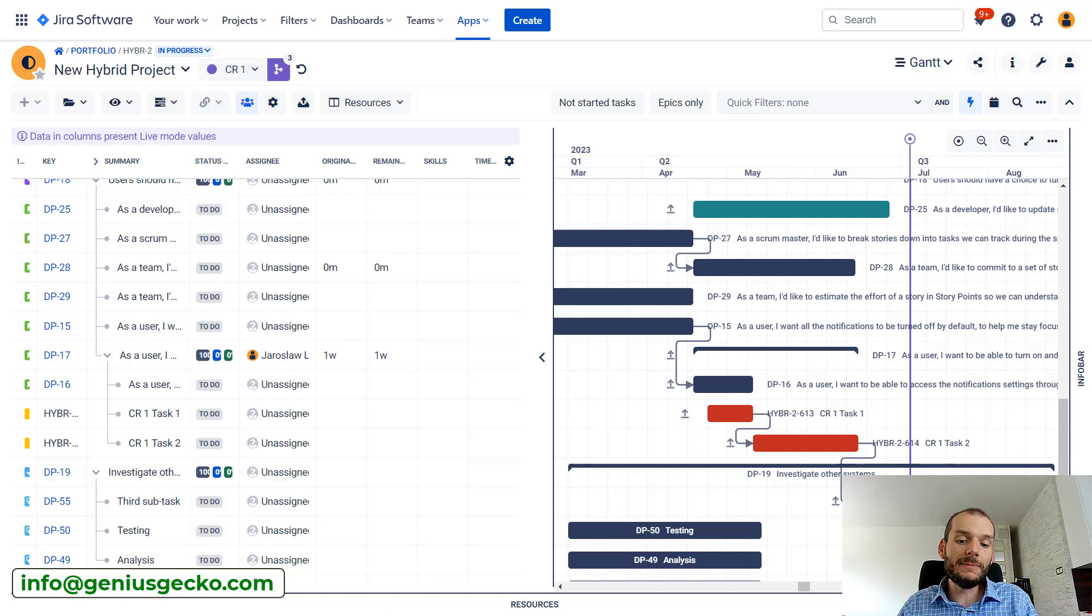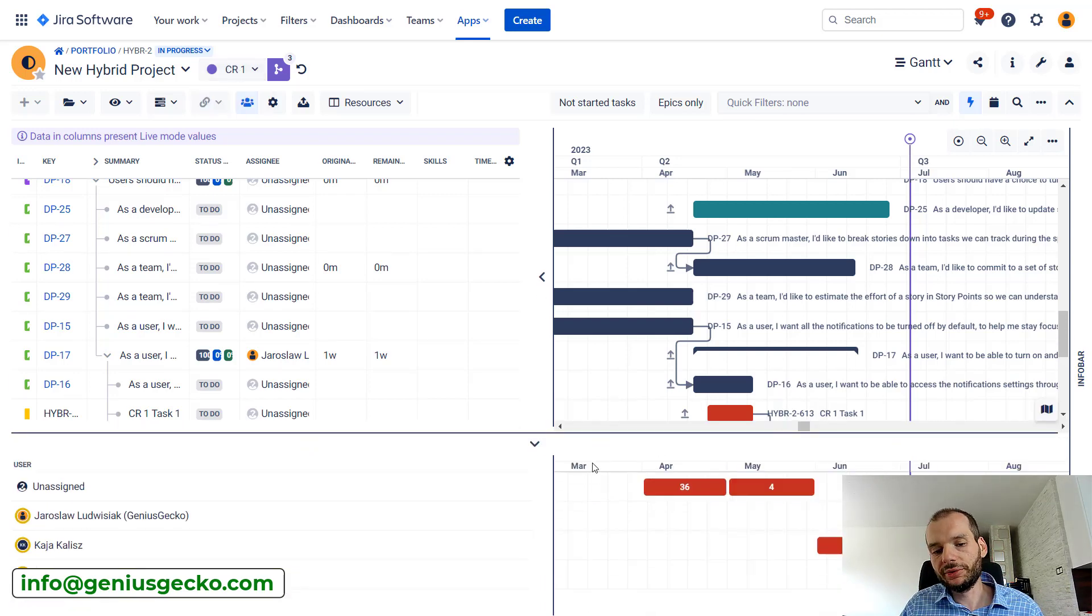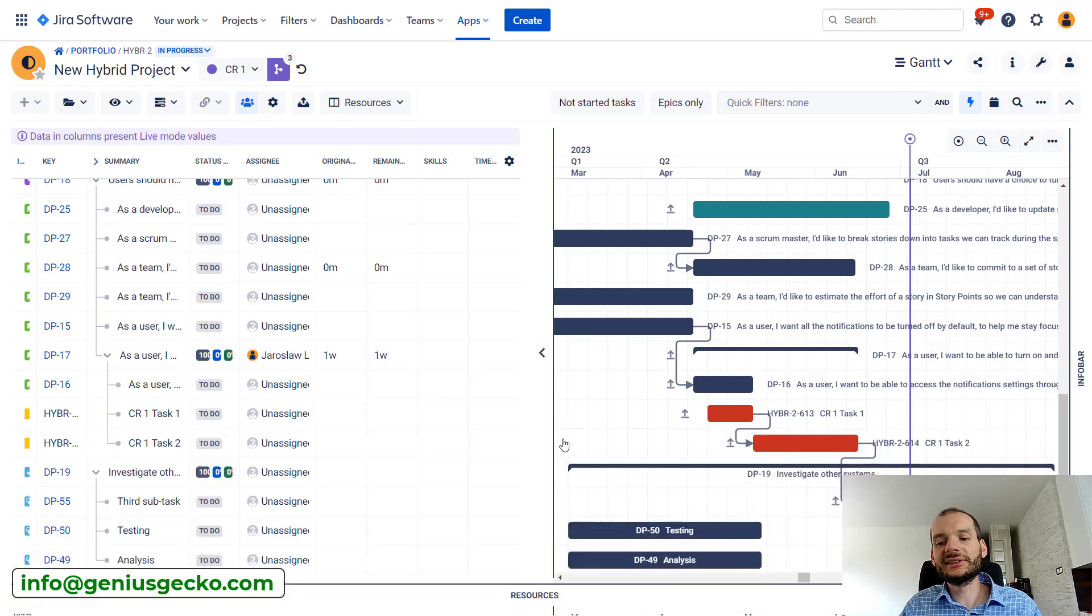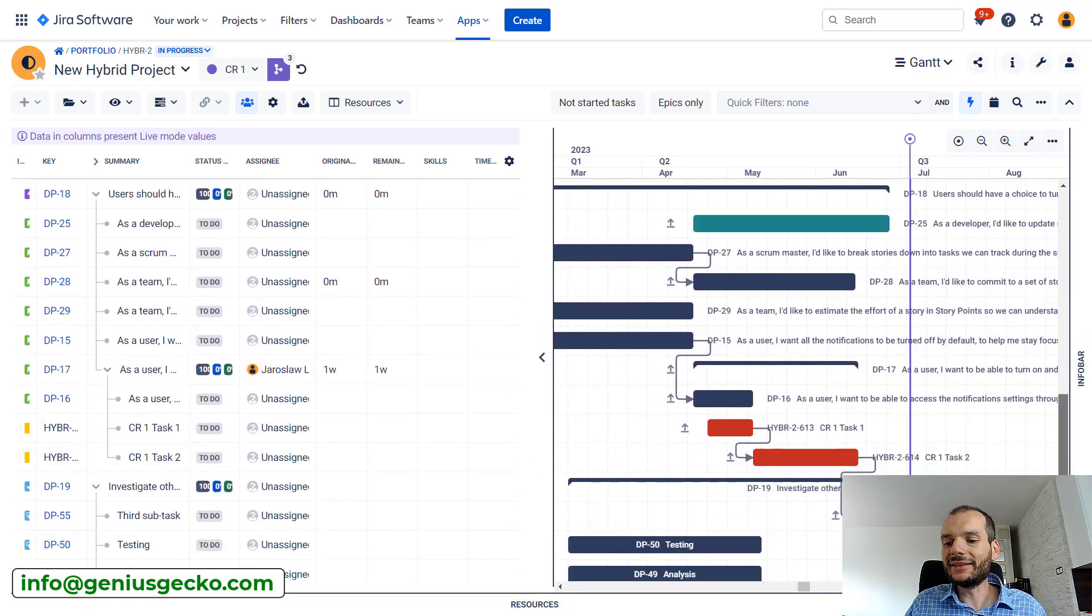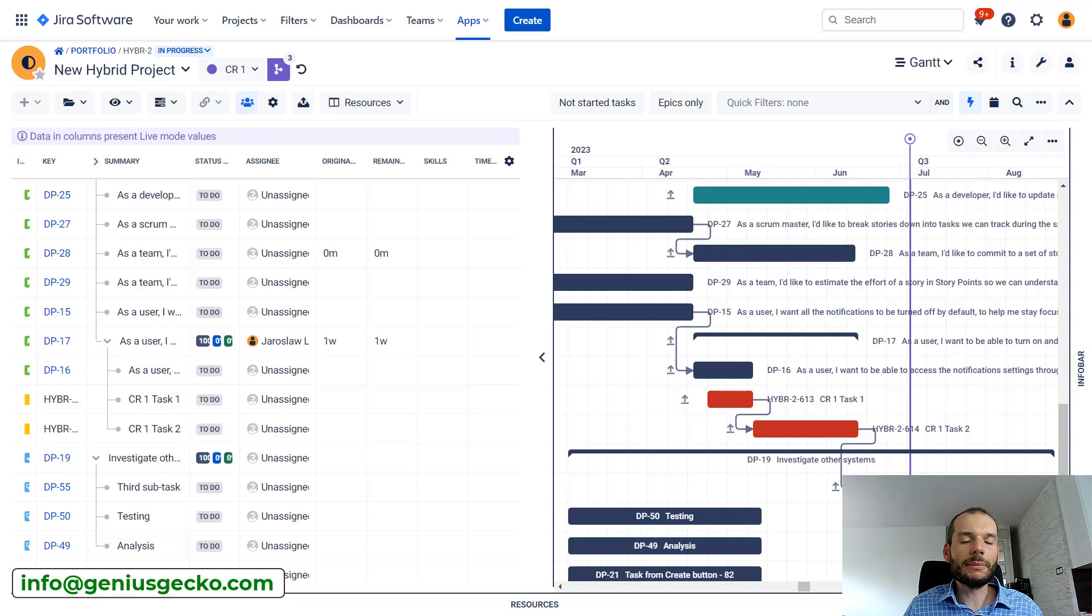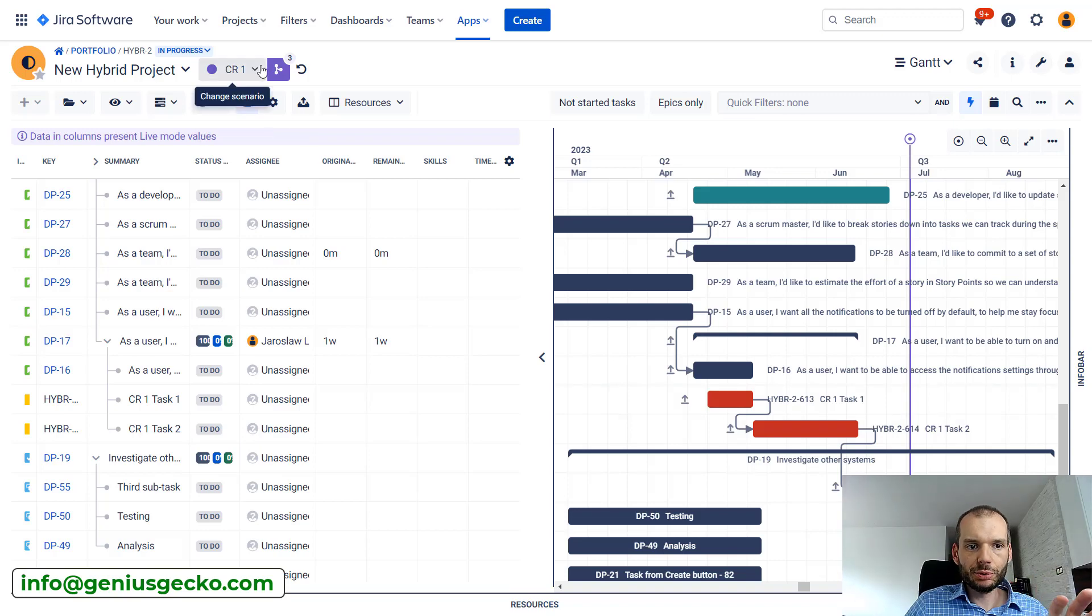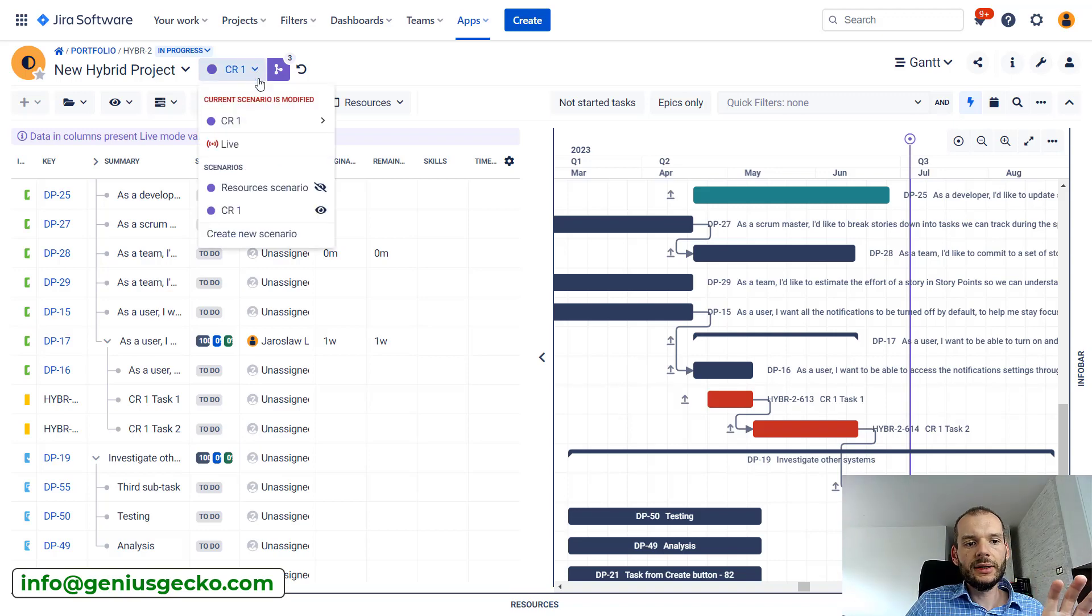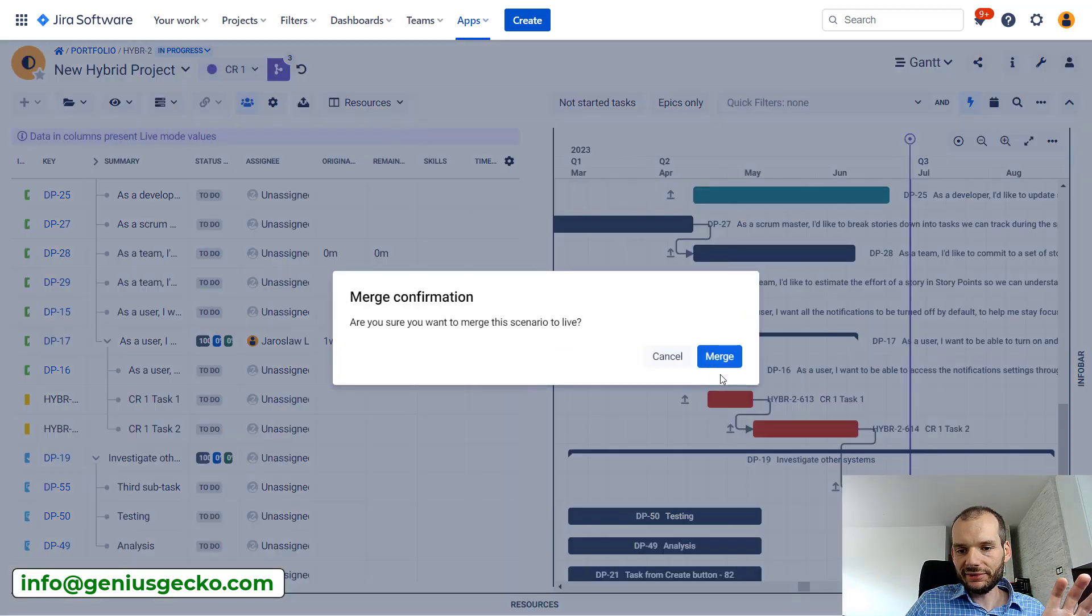We'll do this in a moment. If they will not approve it, or maybe there are some other problems like with resources, you can work on your plan and just step by step bring it to a feasible state. If approval is done, we can go and merge it to live.